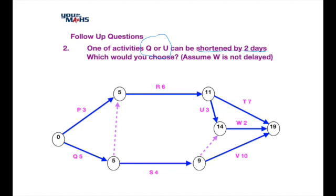Now let's see what happens if we reduce activity U by two days instead — making it one day. The node after U would drop to eleven plus one equals twelve. That only affects the W pathway: two plus twelve is fourteen. But the T and V totals are unchanged, so the minimum completion time remains 19 days. Shortening U has no effect on the overall completion time.